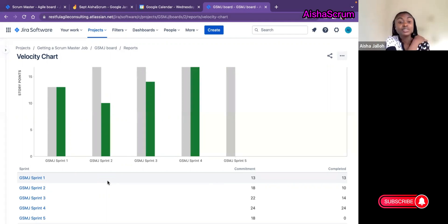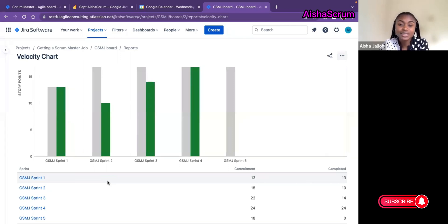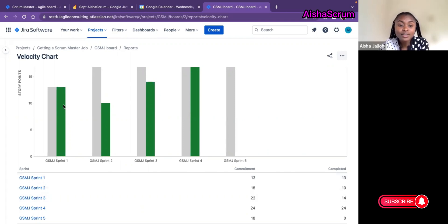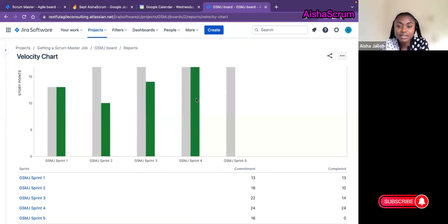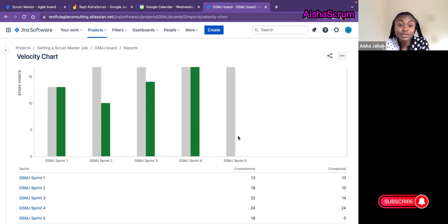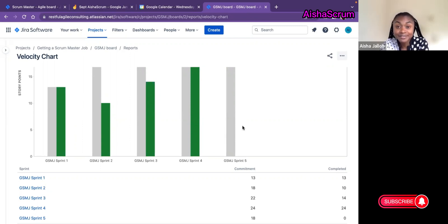Then overall, our goal is to get an average velocity, to get our team average velocity. Jira will automatically give you the team average velocity as they are completing the sprint. To get the team average velocity, you basically will add all the completed stories and divide it by the number of sprints. So in our case, we have five sprints. In this fifth sprint there was nothing that was completed, so we are adding the completed stories and we are dividing it by five.